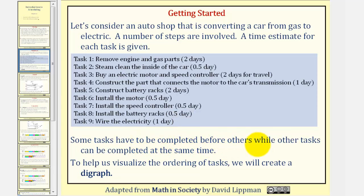Some tasks have to be completed before others while other tasks can be completed at the same time. For example, task one, removing the engine and gas parts, would need to be done before task six, installing the motor. However, maybe steps two and three could be done at the same time. Someone could be steam cleaning the inside of the car while someone else is buying the electric motor and speed controller. To help us visualize the ordering of tasks, we create what's called a digraph.